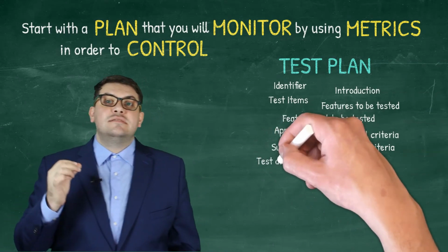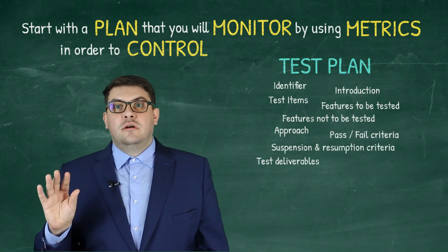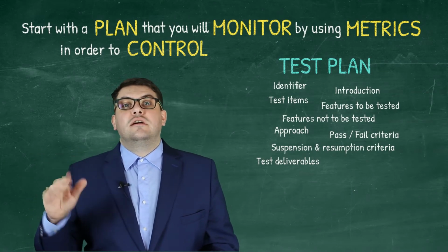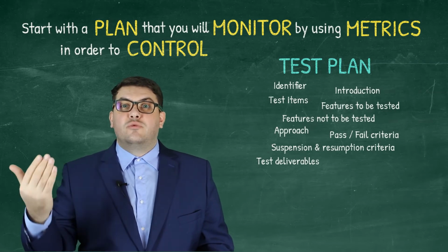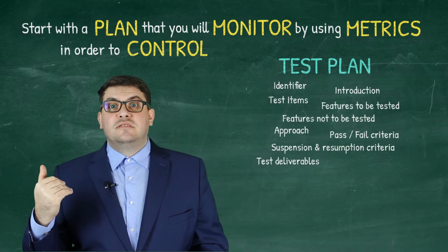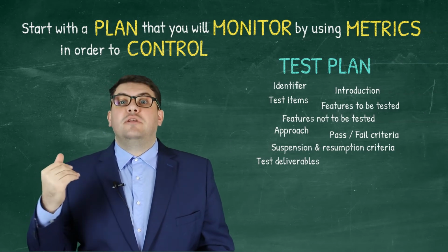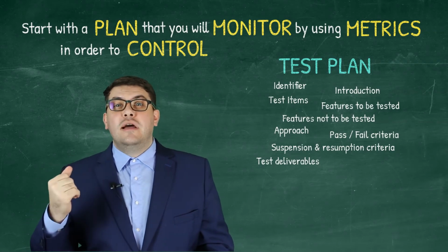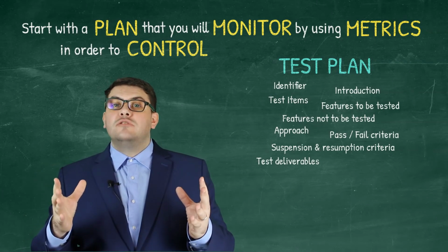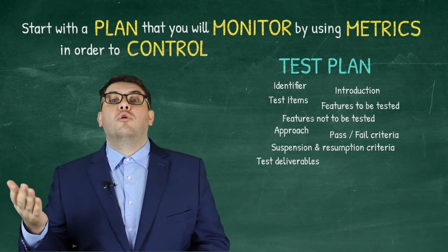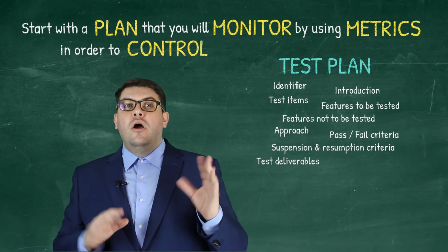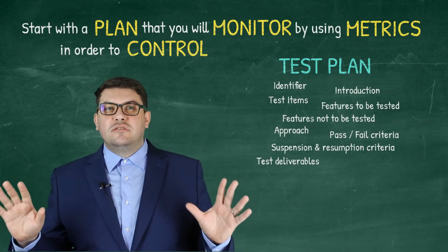It's time to list what are the test deliverables. Okay, we have the test plan, that's clear, but we need to consider test conditions, test cases, test scripts, different levels of test items that need to be logged, need to be tracked, and need to be properly documented and archived, not only for our process, but also for audit purposes or for test process improvement purposes. Okay, we have our test deliverables done.